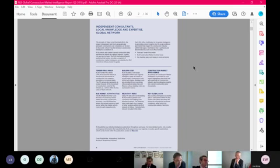And what that did was produce an area that was bigger than the municipality minimum requirement. So I provide more spaces than the municipality says is a minimum. What Mr. Brand did was apply the minimum, which is perfectly understandable, but actually that would make the building less marketable. He said in his report that his costs were below my costs. But if you then apply the like for like, and I take his assumption of car parking, his costs are actually 3% higher. On the HBU, again, there's a table that shows the comparison of the bill costs applied, and Mr. Brand is lower in certain cases, and he's higher in others.